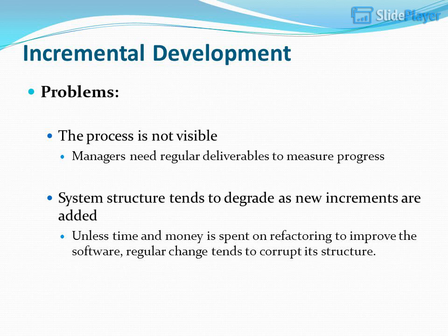Incremental development. Problems. The process is not visible. Managers need regular deliverables to measure progress. System structure tends to degrade as new increments are added. Unless time and money is spent on refactoring to improve the software, regular change tends to corrupt its structure.